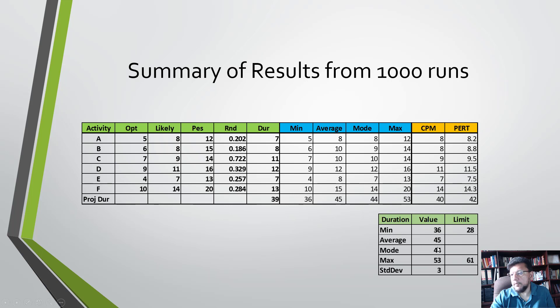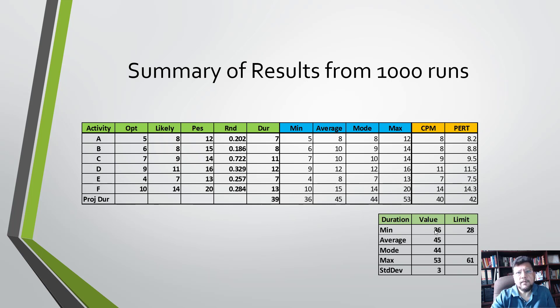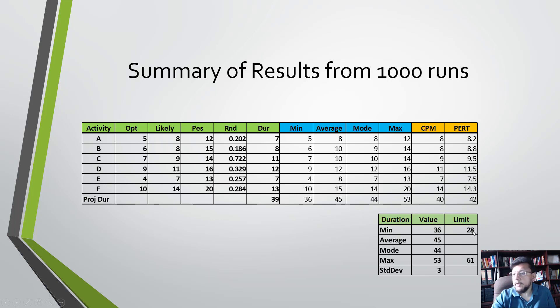The maximum is 53 days. Notice it's interesting that the minimum that we got in this sample of 1000 runs is 36, while the absolute minimum when everything was at optimistic would be 28 days. So we didn't hit 28 days in this 1000 rounds, and that is expected.